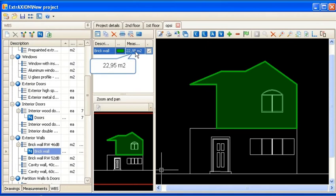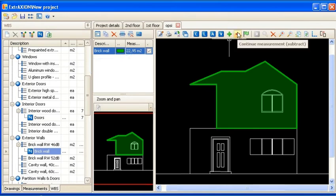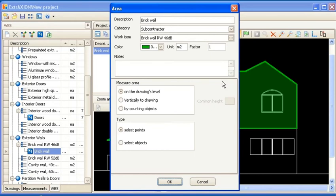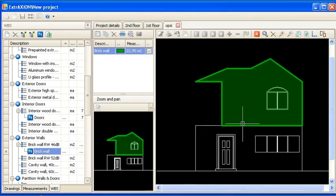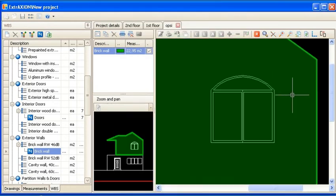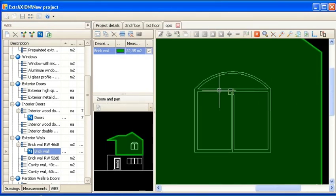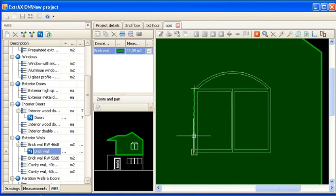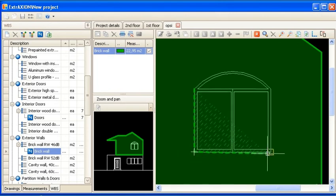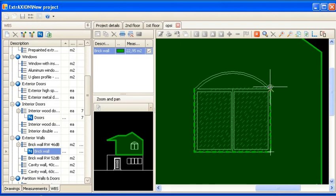Also, with the Continue Measurement Subtract button, you can subtract openings such as windows from area measurements. You are able to subtract curved openings as well.